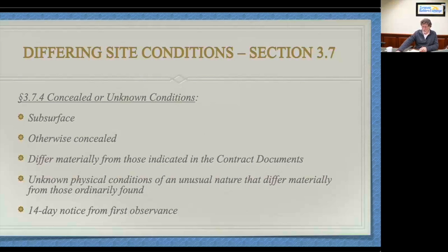The way that a differing site condition claim has to be mechanized is you've got to give notice, and you should give it really before you proceed, always. Differing site condition issues are too important. They can lead to too many problems if you just keep working and don't stop and tell somebody about it. So stop, 14-day notice, get your notice out there of the differing site condition. The 14-day notice is going to be a little bit different than the notice of claim that you're going to see in a little while.